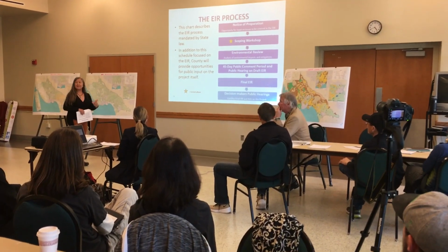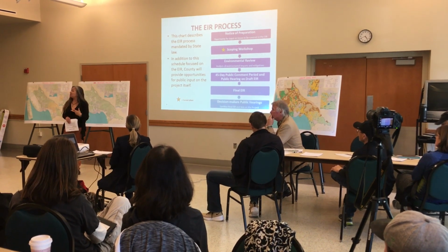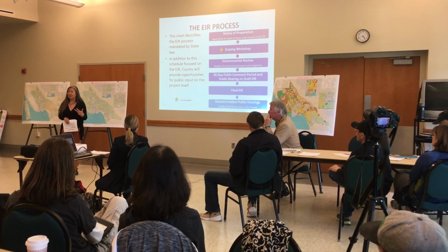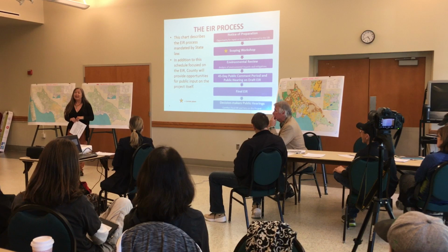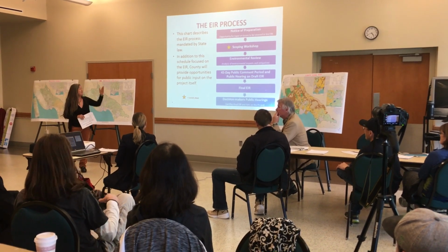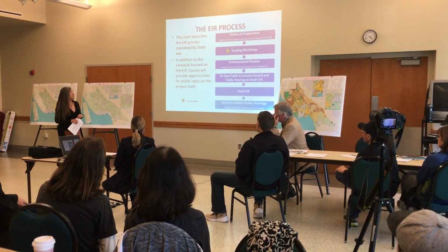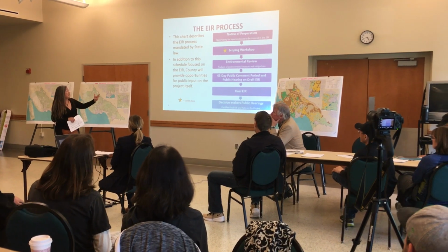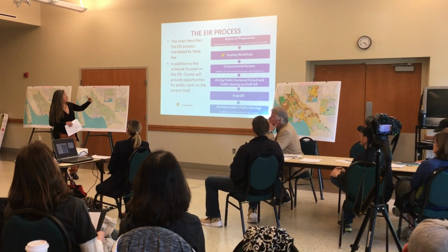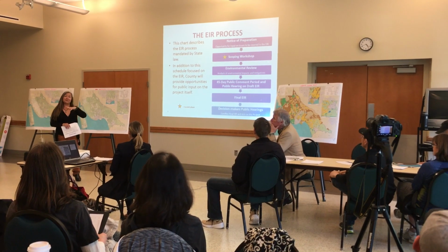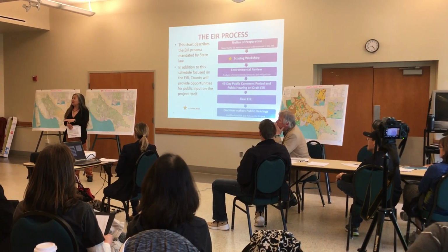And then we'll release what's called the draft EIR, or public draft EIR, and that will be about a 45-day review period. It can't be any less. So we're targeting 45 days. After public comment and review, the lead agency as well as our consultants will consider the comments and